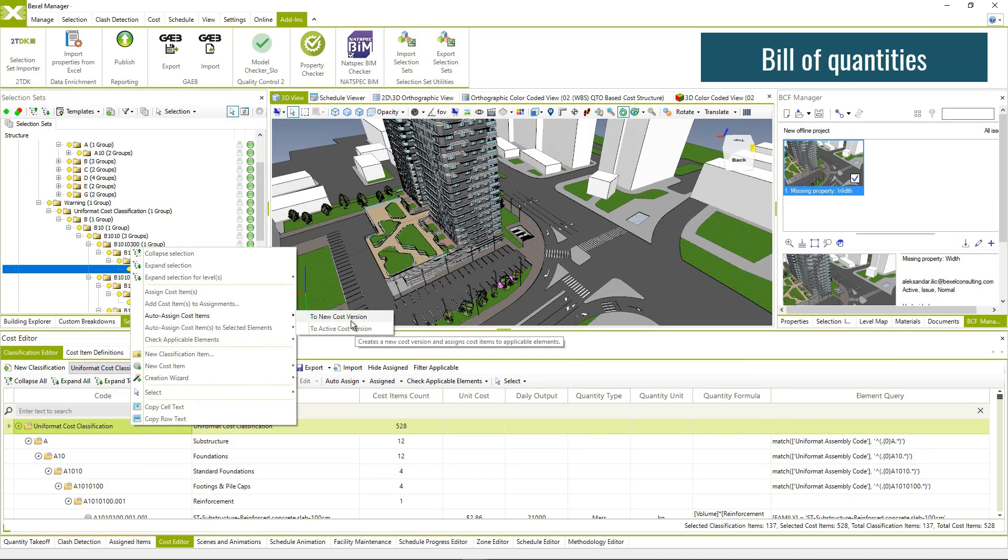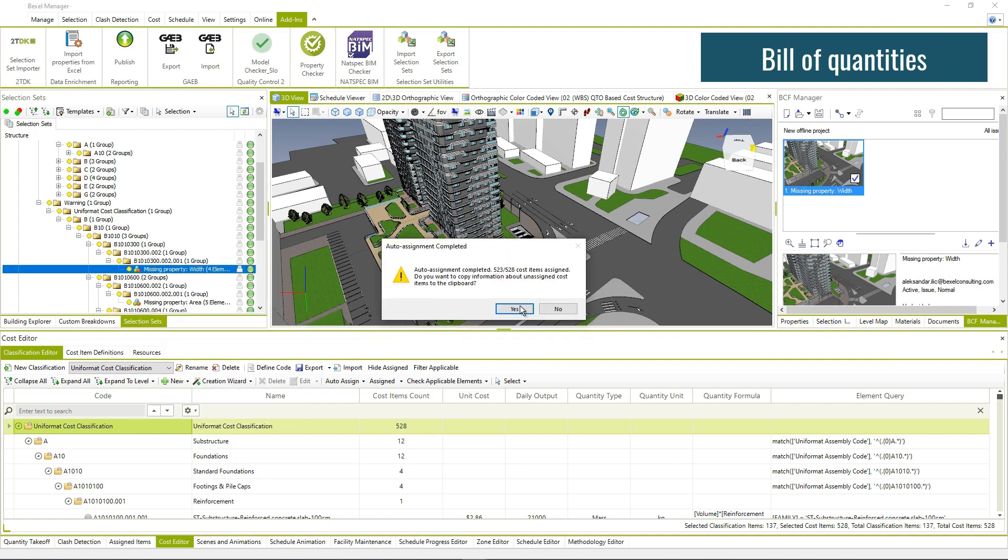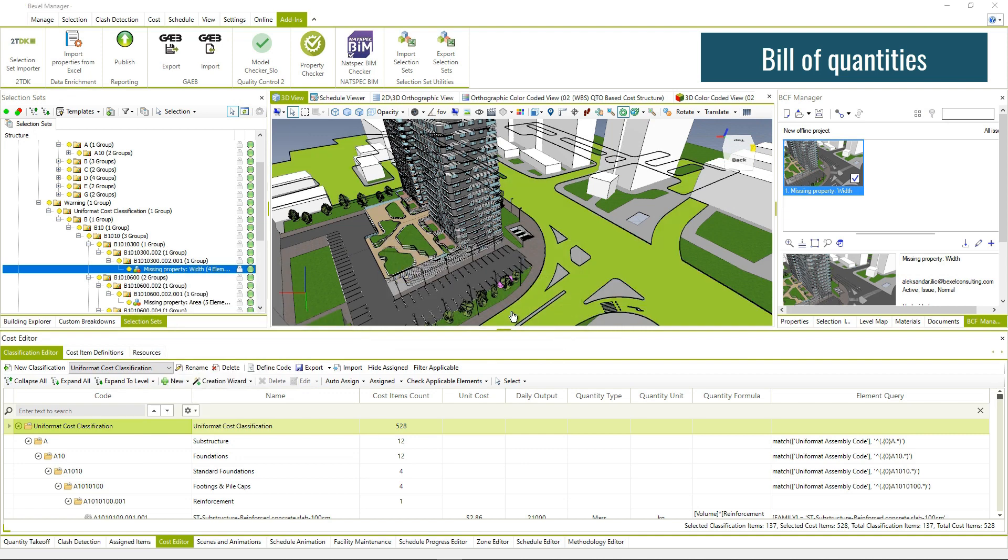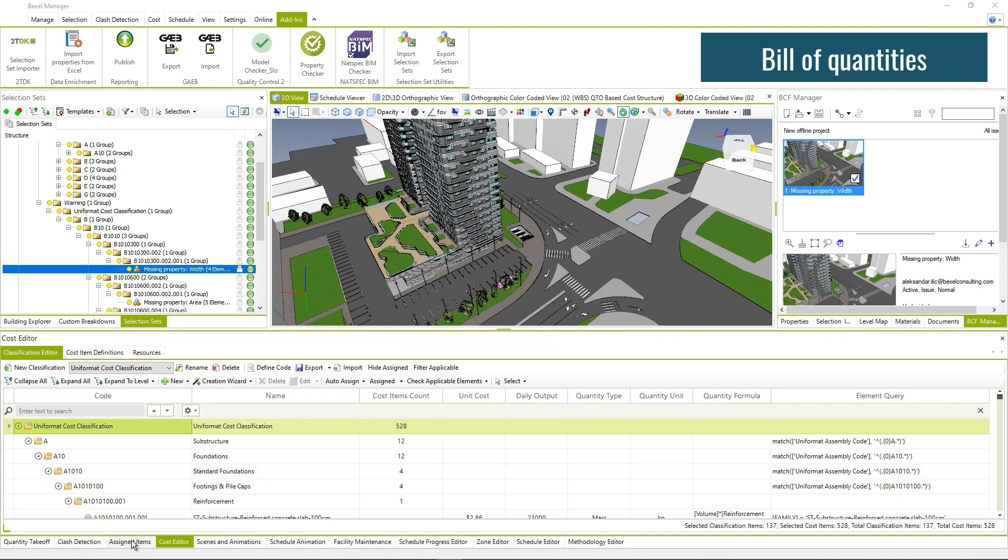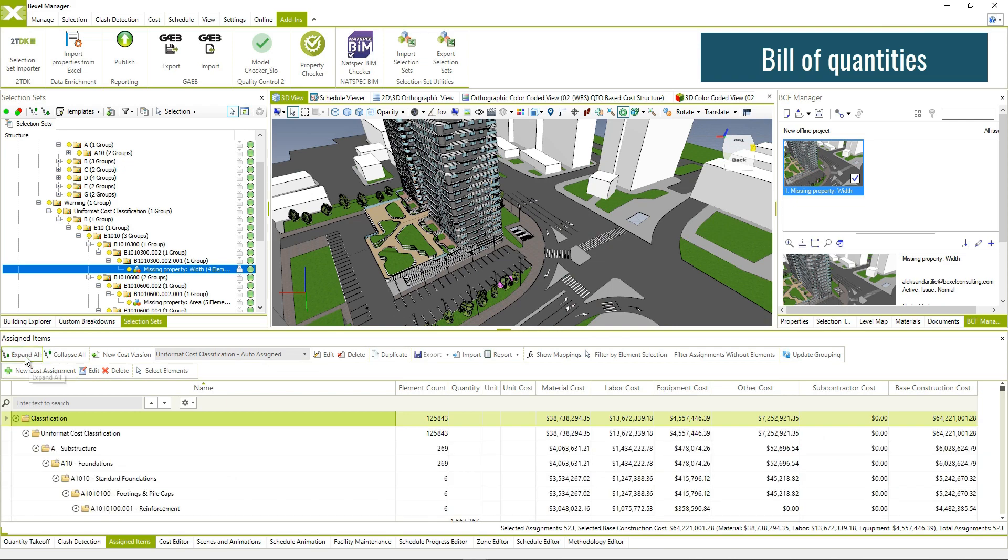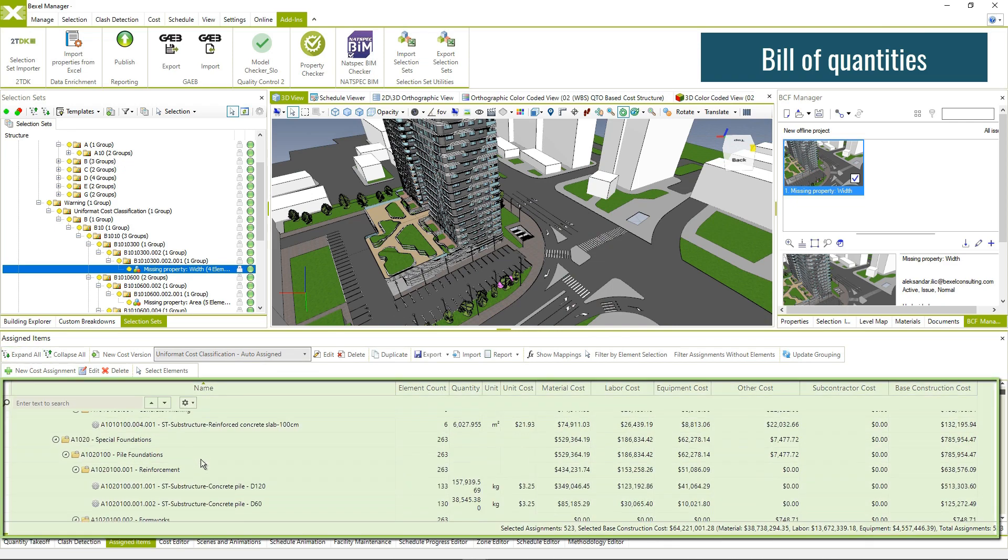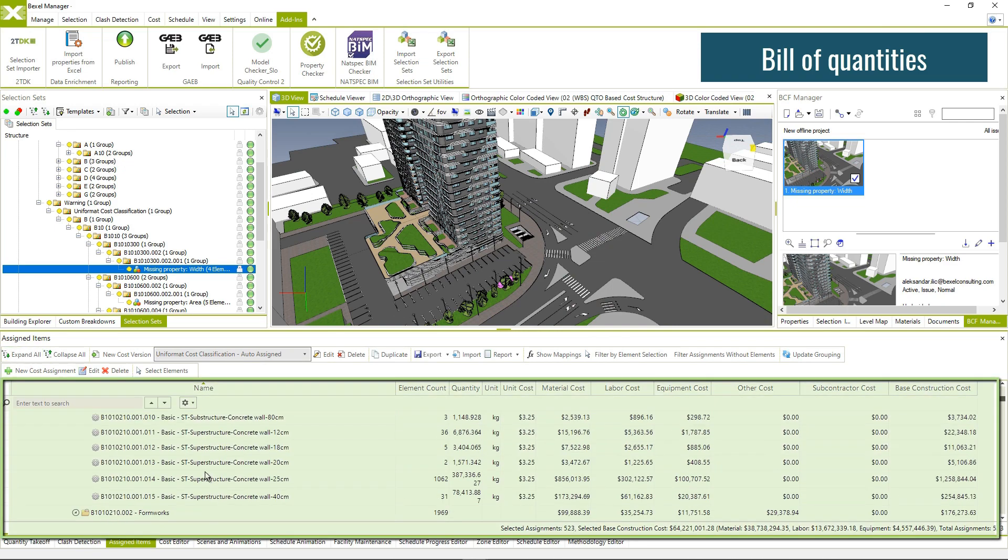Automatically create BOQ based on predefined rules and calculation formulas, containing information about total cost, other costs, subcontractor cost, resources, and supplement cost.